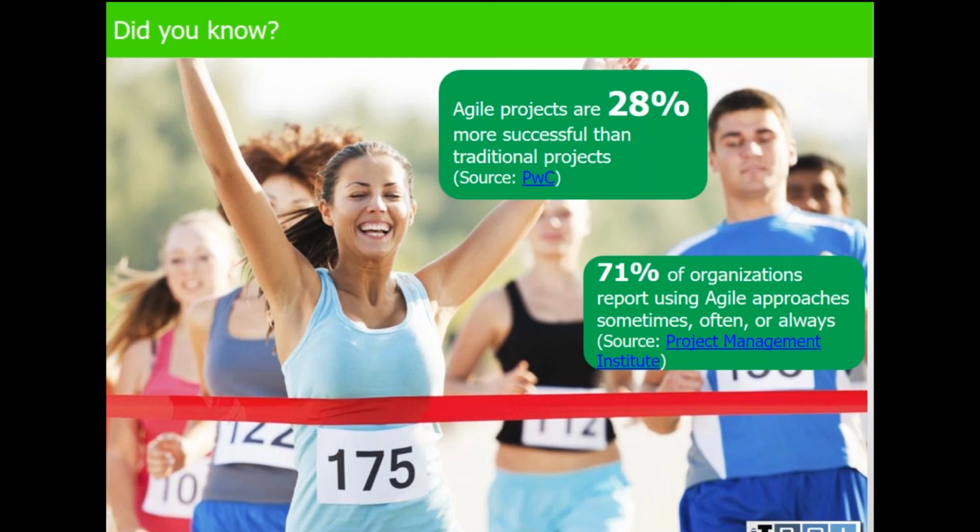Both methodologies have major benefits and they have major drawbacks, right? The hardest question is to figure out the type of project. Because why? For one, you need to know your project team, your resource availability, and the expertise that one has to figure out which is the best approach to use. For example, generally, the traditional or waterfall approach is very linear and rigid. Generally, one stage cannot begin before the previous stage completes. Therefore, it's not very flexible for change.